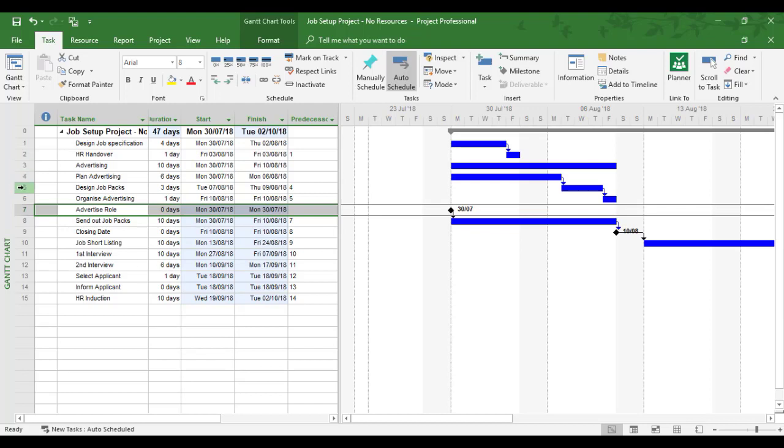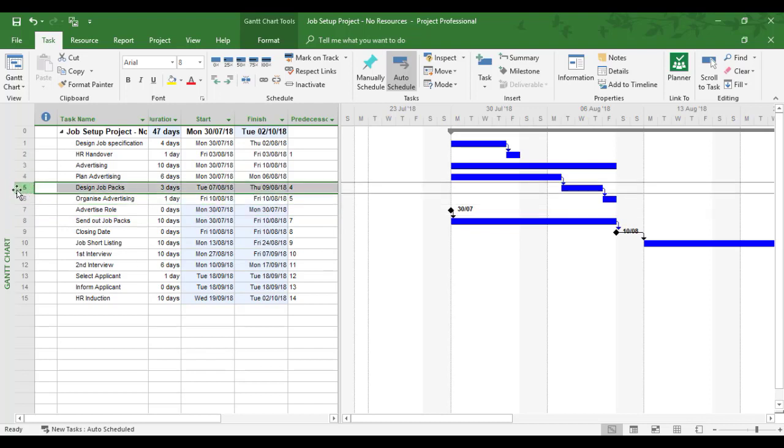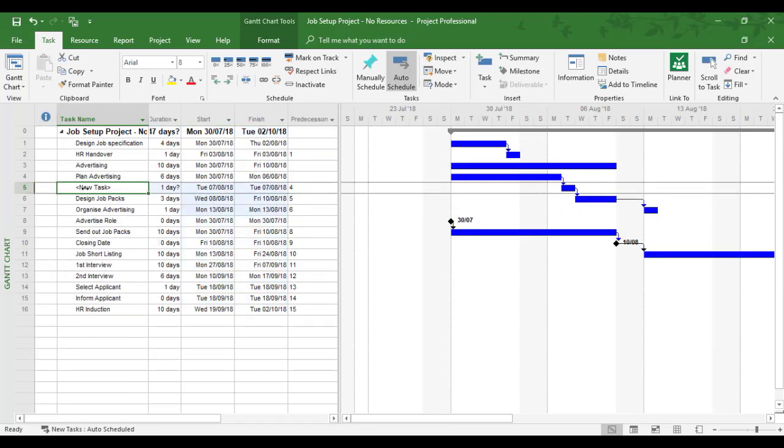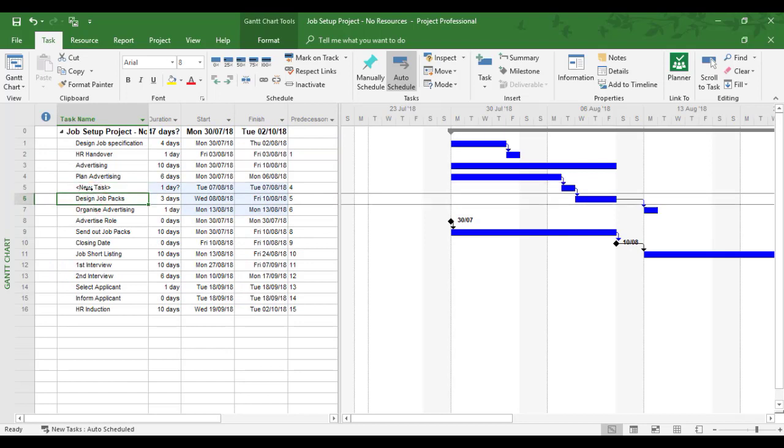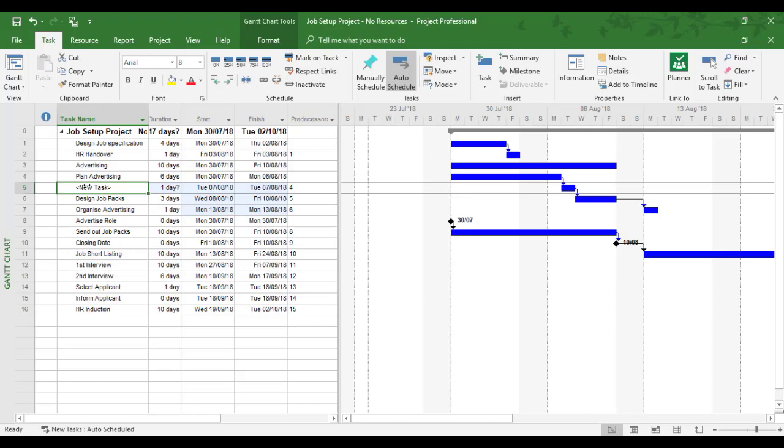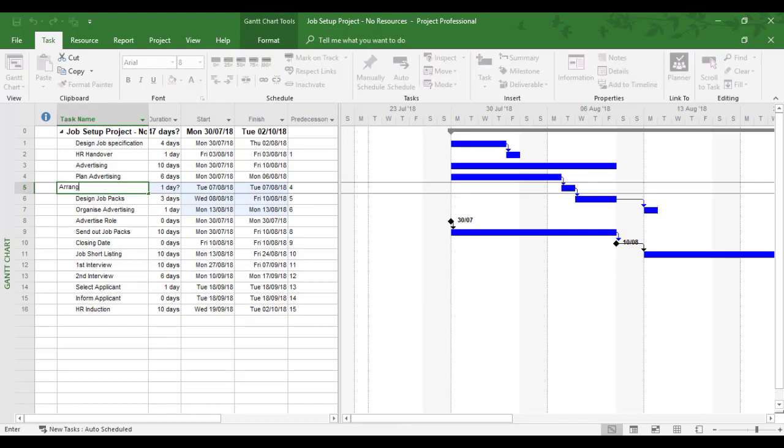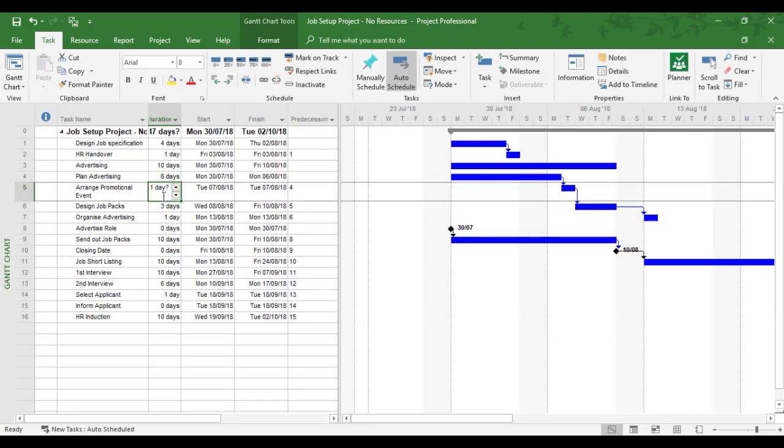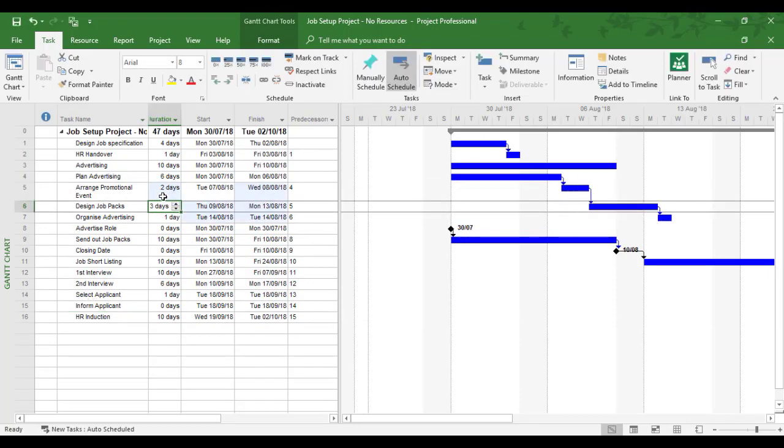So here we go. So after plan advertising, I'm going to insert into the task so I can right click insert. I'm going to call that task arrange promotional event. Okay, and that's going to be a two day task.